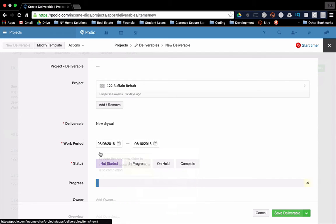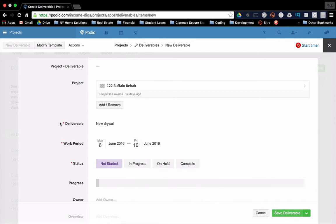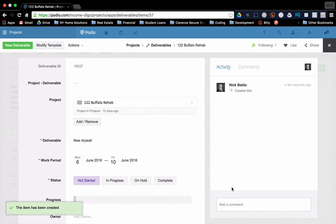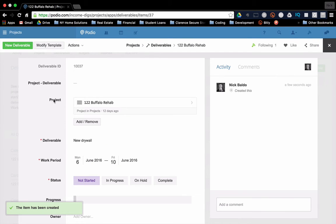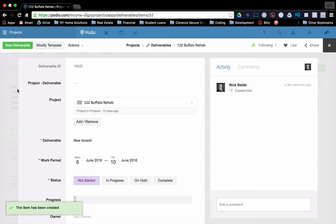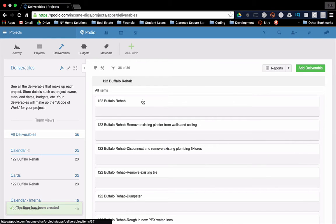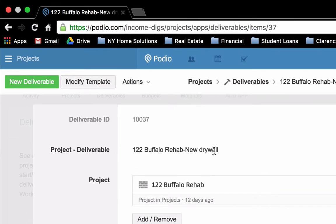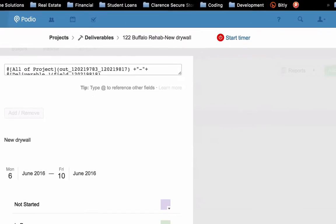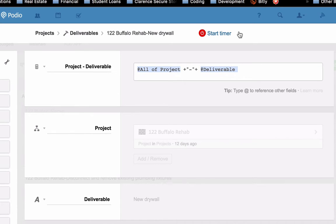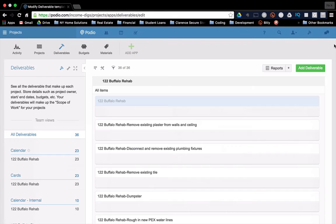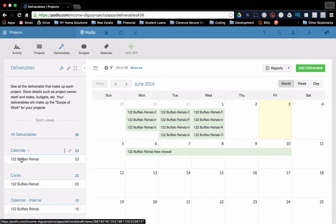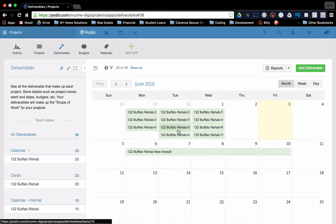Now one thing that I'll point out here is we use a lot of calculations. You enter a lot of data and we calculate a lot of data. So one thing that's calculated is, we'll save this and then we'll go look at it. One thing that is calculated is the project deliverable. The title of it is calculated. Okay. So that's a very simple calculation. If we go and look at what this is, it's take the project name and add the deliverable name. Now there's a very specific reason why we do that. In the case where we have multiple projects, we would want to see, what project we're talking about in the deliverable. Okay.